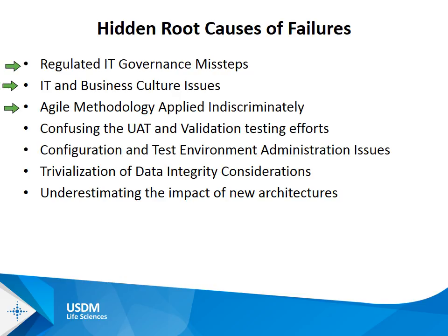But in practice, having seen the outcomes of many agile methodology projects, everyone goes in with a very rosy idea of how this is going to be so beneficial. And it doesn't often turn out that way. The majority of it is that requirements are constantly evolving during this process, which is great from a pure system development perspective. I think it works very well for the users. But when it comes time to validate, it's very hard to validate a moving target. And often we see these projects get extended, and what was thought to be a cost-saving measure ends up increasing costs due to the confusion related to that.